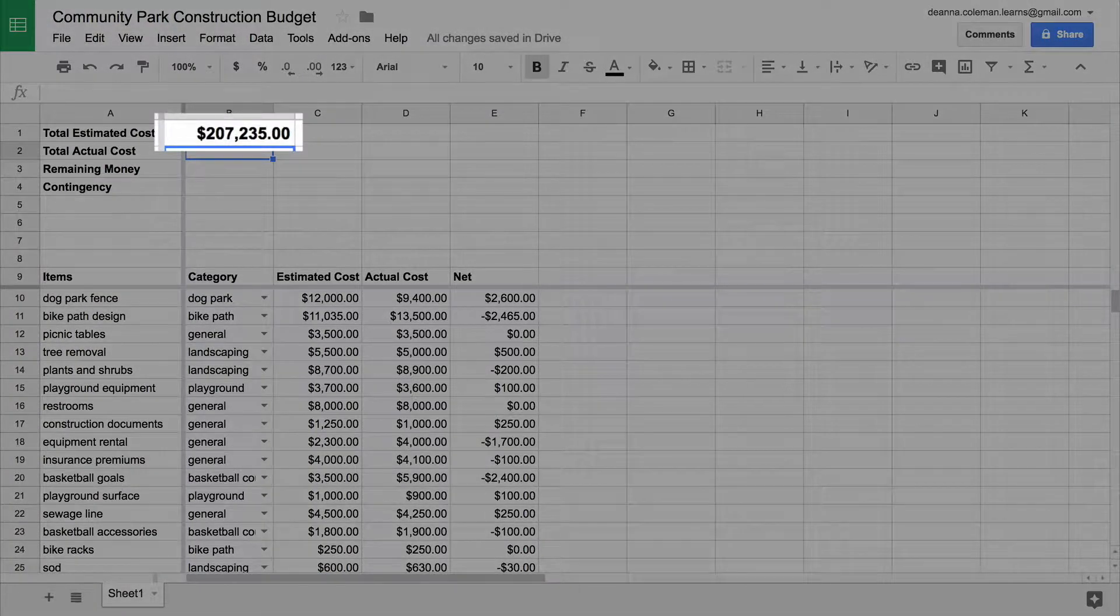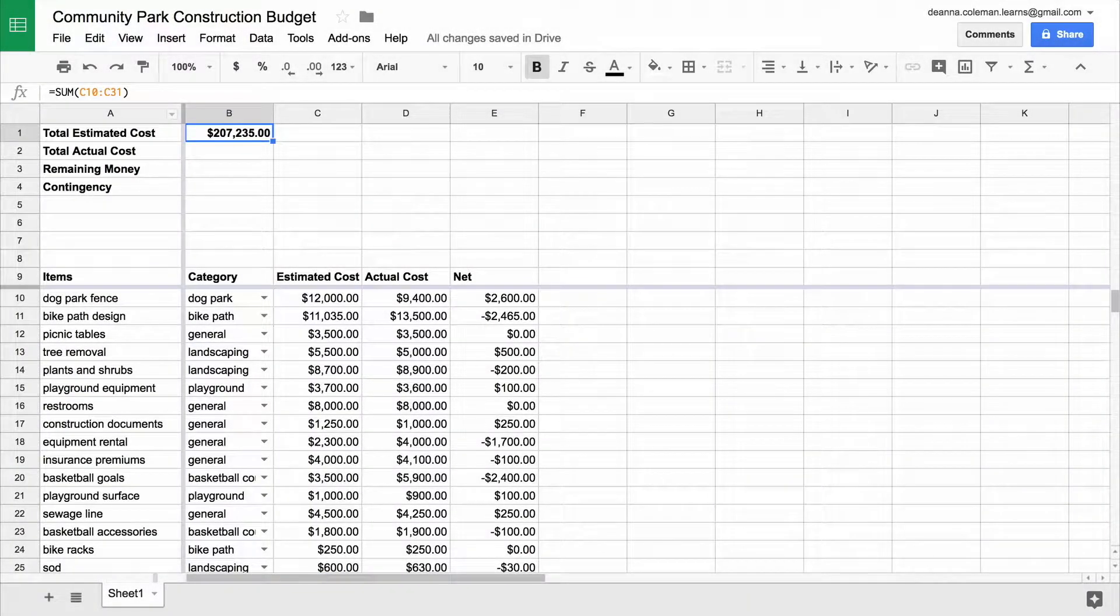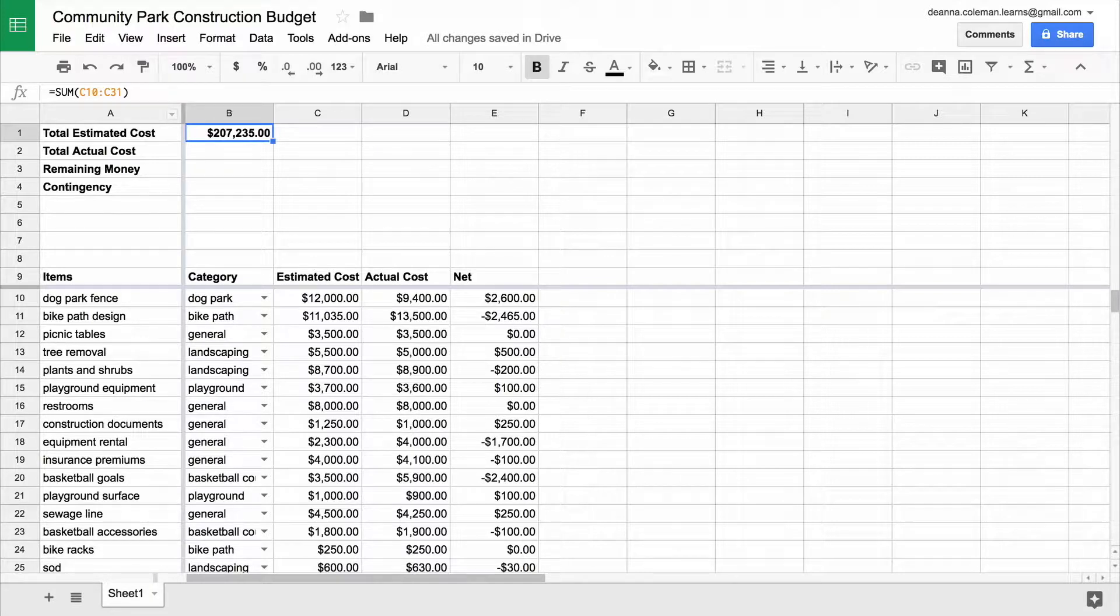The cell now contains the total estimated costs for your project, from the first row of the items until the end of the column. If you add more line items later, the formula will work for those items too.